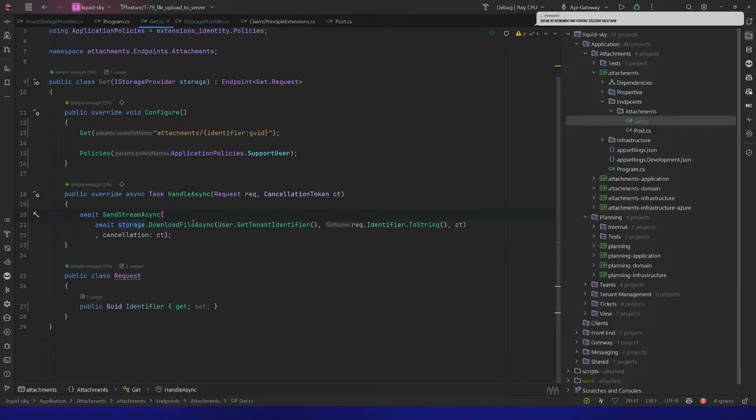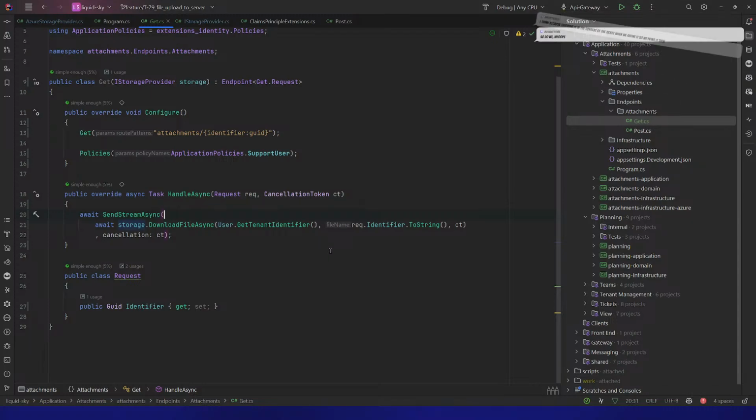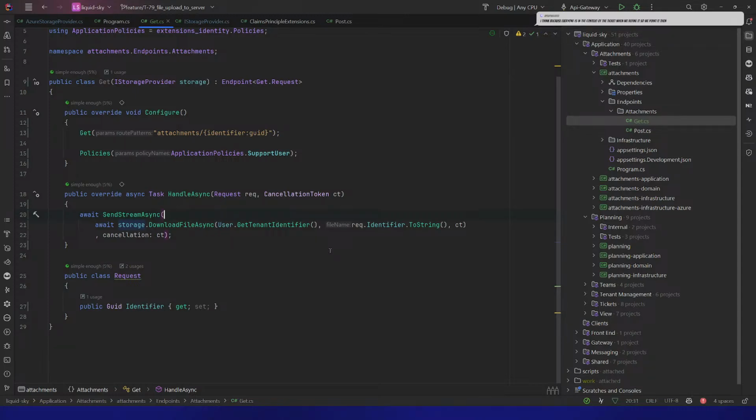Yeah. So grooming or refinement. It can be hard because the pointing session can go on forever if you are trying to do all the refinement. So I would say break it out, have a meeting for grooming and have a meeting for pointing. And pointing should only happen when you're comfortable with the work. So you say, yep, this is ready for pointing.